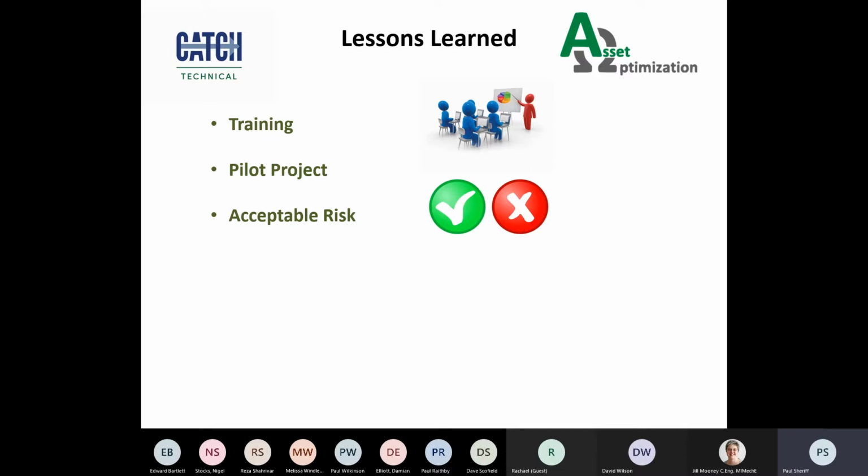There are also fears for them around litigation. In the UK, the issue of acceptable risk is made more complex as the HSE regulator has a goal-setting attitude to safety standards and is always looking for a company to continue to improve and reduce risk to ALARP, or as low as is reasonably practicable as well. And we found that one way through this process is to facilitate a meeting of the site management team in order to determine acceptable risk targets and levels.